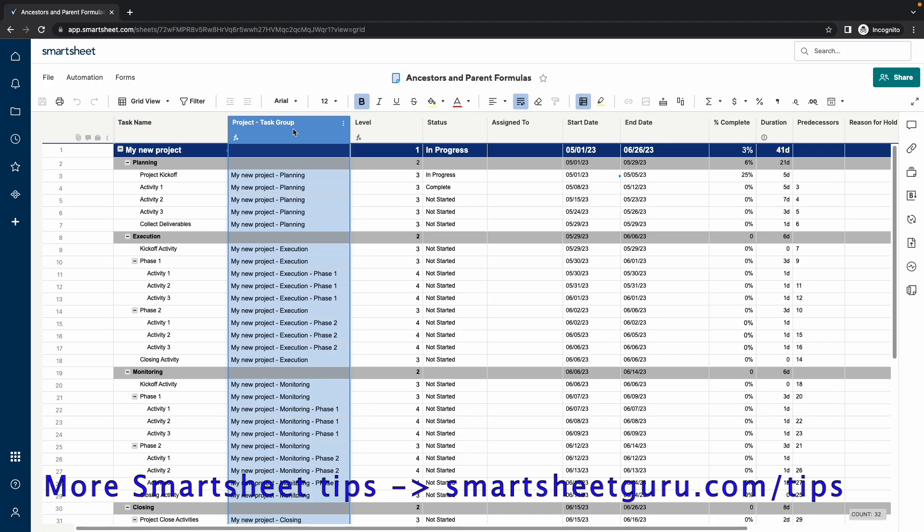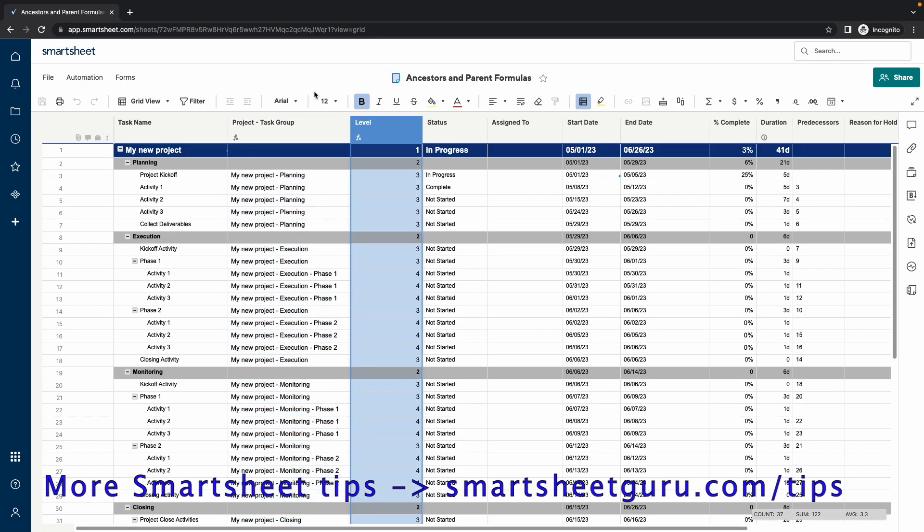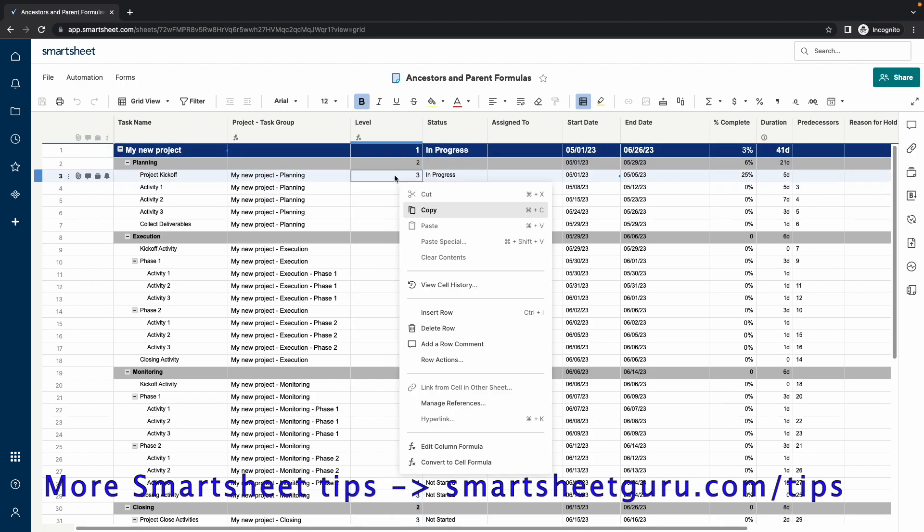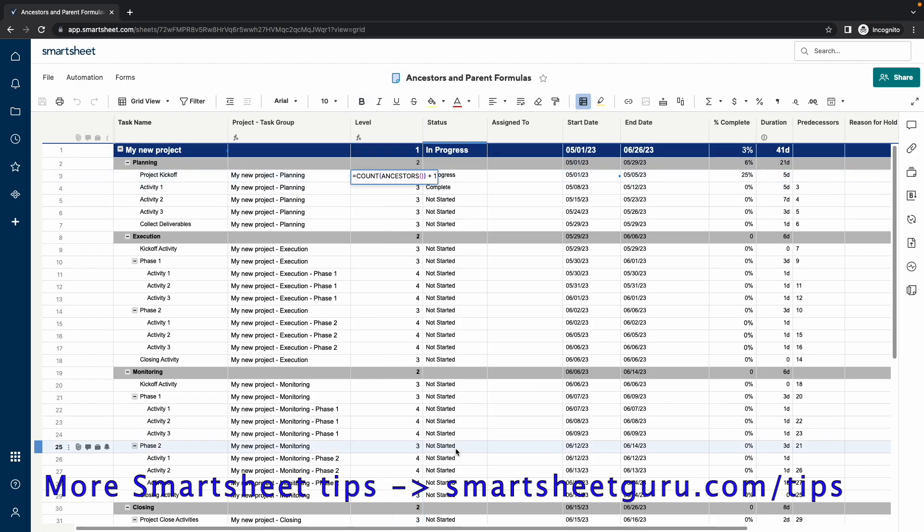First, let's talk about the Level column. This column determines a level of hierarchy of the row with 1 being the highest. It is calculated with a simple column formula. The formula is count of the ancestors plus 1. I added the plus 1 so that the level of hierarchy would start at 1 instead of 0.